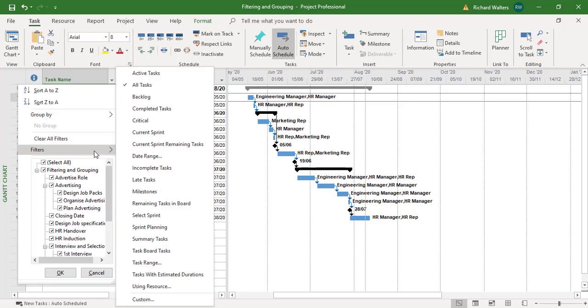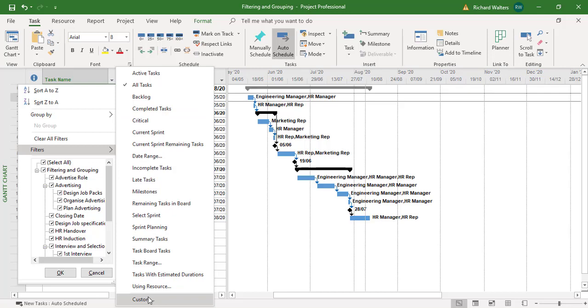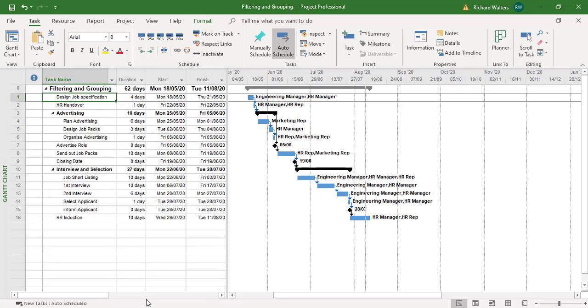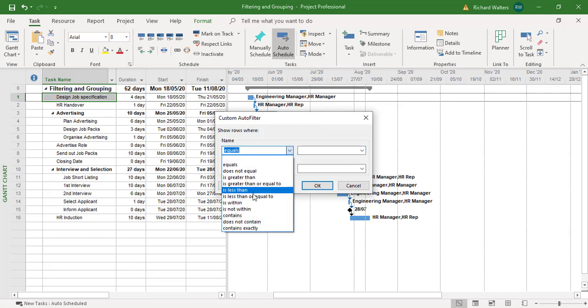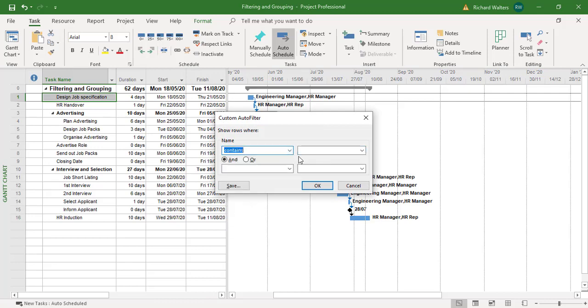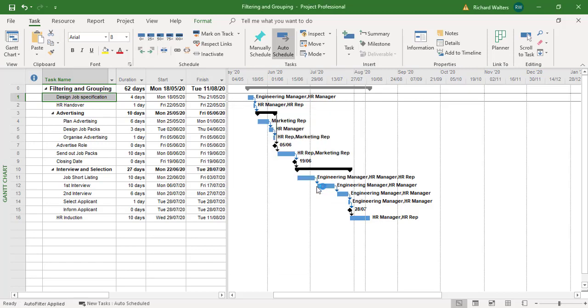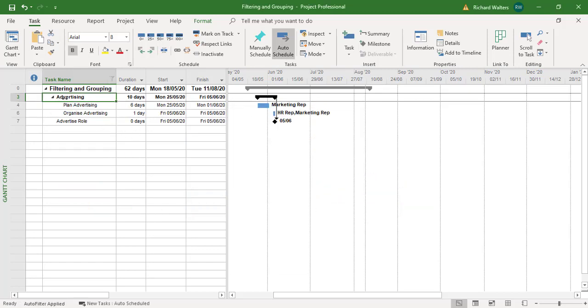Filter and there's a whole lot of choices here. There's also custom. So I'm going to use custom and say contains and I'm just typing the word advert and there we go. So everything that contains advertising has now been picked up with the word advert.